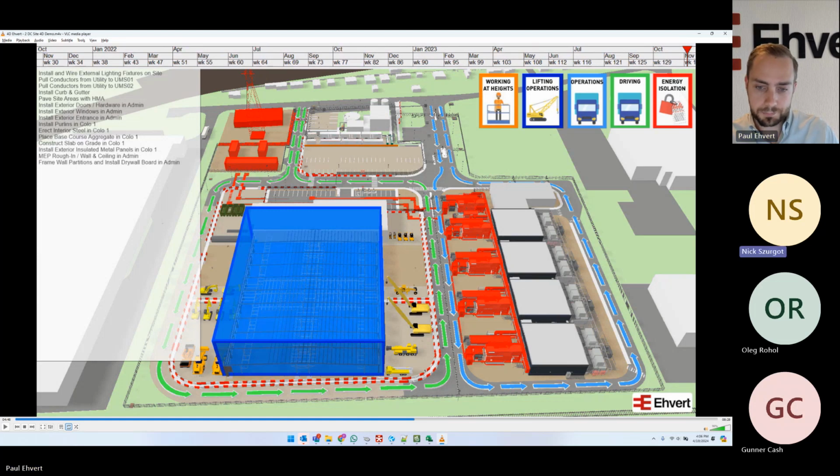Yeah. One other thing that's going to be really critical here is there's this redundant power line that is likely going to have to go along the east end of the equipment yard, directly adjacent to all of the work. It is likely going to be a 25 to 30 foot deep trench that needs to be dug to accomplish that, with a really tight workspace next to it for really heavy, large loads that need to be swung.